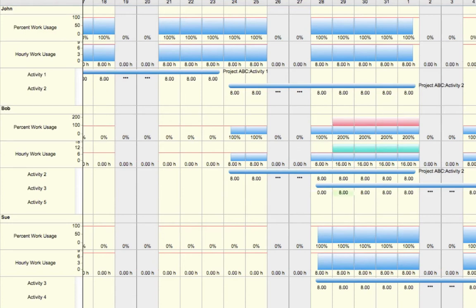As we do this, you'll notice that the graph above automatically refreshes to now reflect the eight hours that Bob is working on Activity 2 and zero hours that Bob is working on Activity 3.